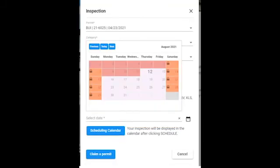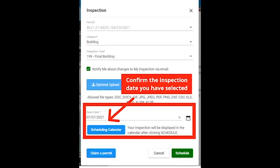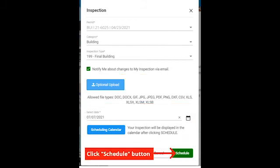Click the calendar icon next to Select Date to choose an inspection date. A calendar will pop up on your screen — click a day on the calendar to schedule your inspection date. Dates that are light pink are available for scheduling. You are not able to request an inspection on dates that are red or have a lock on them. The Select Date line will be automatically filled in once you click on a date. Please confirm this is the correct date and then click the green Schedule button below.